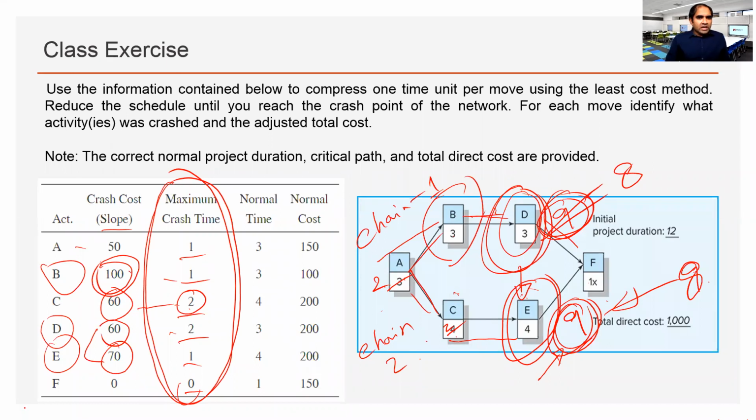As you can crash 2 times, so I'm asking how it will work. So you mean from the beginning, if we crash exactly C and D, chain 1 was already lowest day. So chain was already on 9 days. So there is no point in crashing C and D simultaneously. We can only crash C and reduce the number of days. We cannot pick random activities to crash.